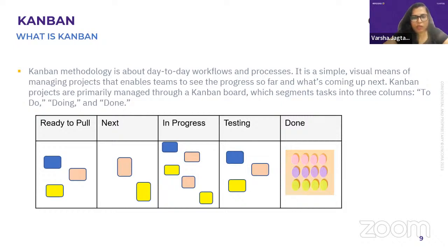Generally they put the tickets which have a requirement baseline in a bucket, saying the requirement is baselined and we can work on it. Next is something that I will decide priority-wise. Out of these requirements, maybe these two, in the next section, you might have seen the two boxes, are my highest priority items. Now the developer has already started working on that, so he will make the status in progress.